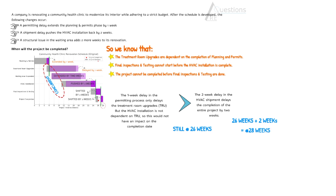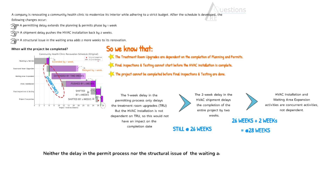The tricky part here is the delay in the waiting area expansion. The waiting area expansion is a concurrent activity with the HVAC installation, so it doesn't have an impact on the overall schedule. Another important point to remember is that even though the treatment room upgrade is pushed by one week because of the delay in the planning and permit process, that does not have an impact on the start of the HVAC installation — because HVAC installation is not dependent on the completion of treatment room upgrades. So neither the delay in the permit process nor the structural issue in the waiting area expansion would have an impact on the project completion date.